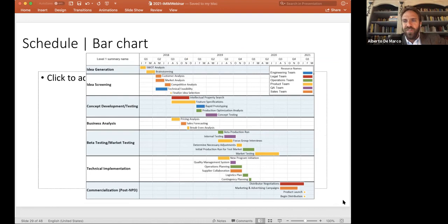So many people are familiar with using project planning software tools such as Microsoft Project or Project Libre or any tool that creates a schedule like a Gantt chart like this one. Excellent. So everyone in a team is responsible for an activity. Everyone is assigned. So when I finish, there's someone else that starts executing the next task, and everything relies on work specialization. Everyone does something. And if I fail, I will be the cause of delay for my successor.